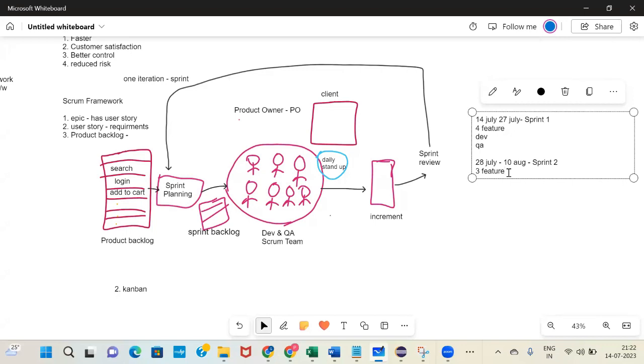As I'm saying, there is no extension of the dates. You cannot push the sprint 1 end date to any date beyond this. Whatever is remaining, like some issues or some features not developed, for example instead of 4 features you are able to complete 3.5, that remaining 0.5 will be considered in sprint 2, because we are not allowed to extend the dates.